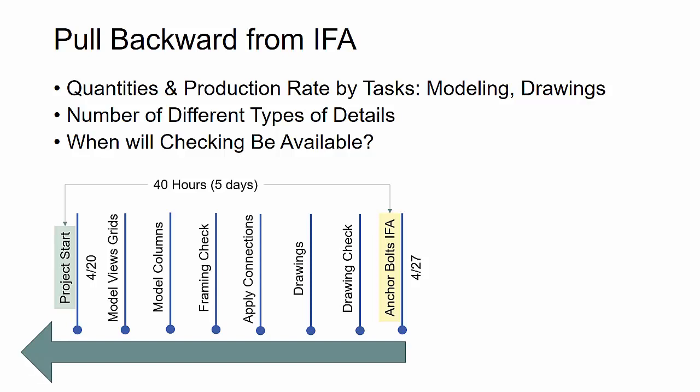With that all being said, what I almost always see new lead detailers get in a snag with is that they spend a lot of their energy on the front loading of this, and too much time is calculated and used up in the modeling phase, and then they get in a really bad crunch at the drawing, production, and cleanup phase.